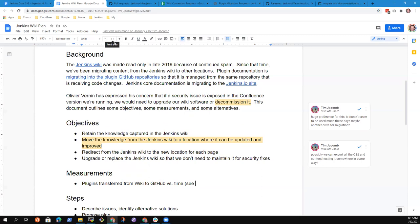And the Jenkins wiki plan describes how in late 2019, spam caused us to make the Jenkins wiki read-only. And since that time, we've been making progress as we migrate the content from the Jenkins wiki to other places. Plugin documentation is migrating into the GitHub repositories and Jenkins documentation. So things about Jenkins core or higher level concepts is migrating to the www.jenkins.io site.